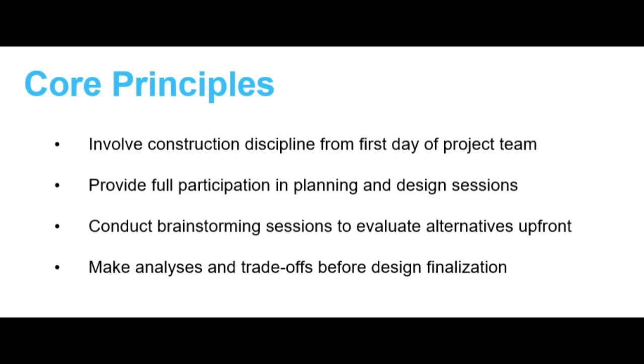The fourth core principle is make trade-offs before finalization. That means compare options quantitatively. Trade-offs should be supported by numbers, not only opinions. Direct cost, time impact, quality, and long-term performance. Decide on time versus cost versus quality at design stage, not at site.